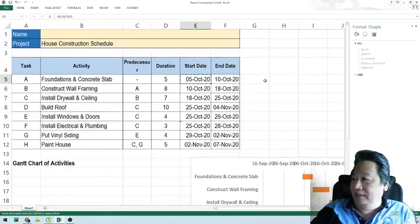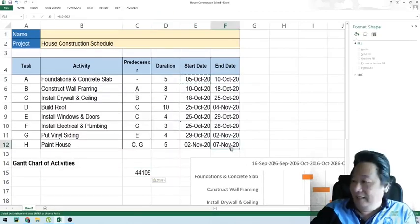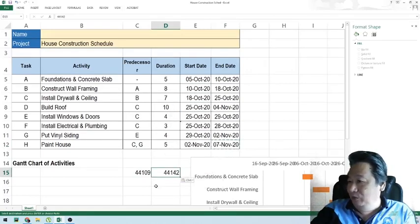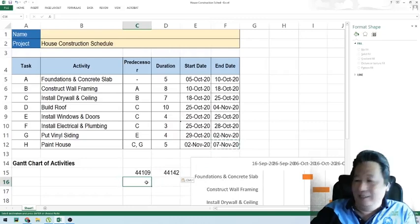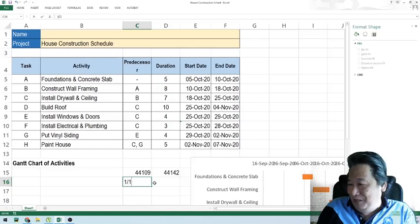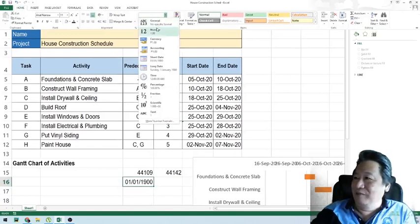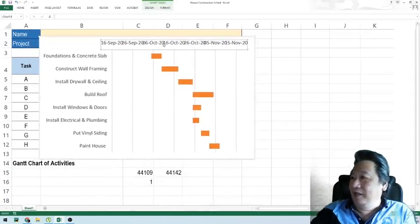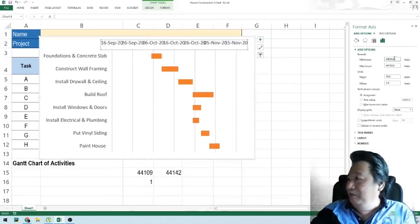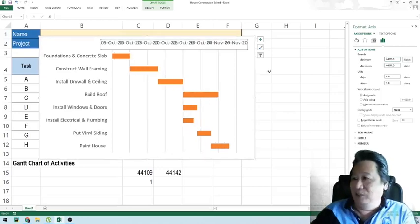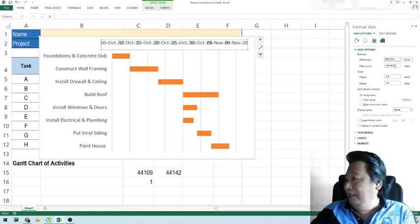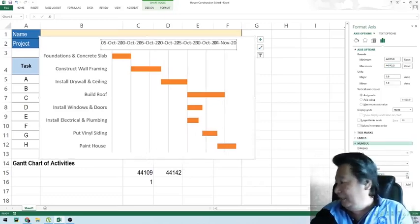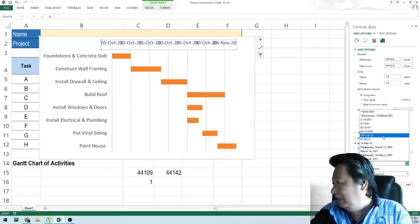We copy the starting date value and the ending date, which is November 7th, and paste the values. Excel uses day number 1 as January 1, 1900 — so dates are stored as day numbers. We fix the axis minimum to 44109 (October 5) and the maximum to 44142 (November 7), then change the date format to a shorter format.